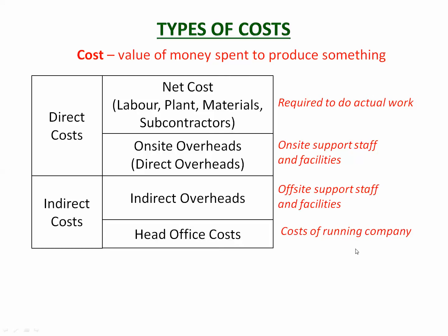That's the cost of running the company. So that might be the company head office, the office building itself, the equipment in the office, the office manager, the people that are actually running the company. So all of those costs there all need to be incorporated into whatever project you're doing.